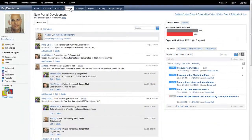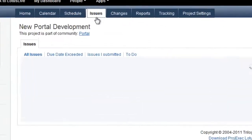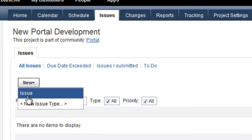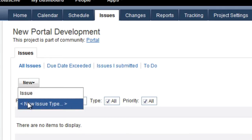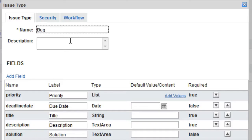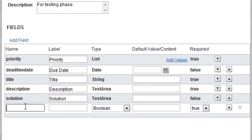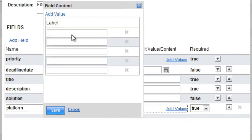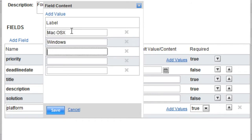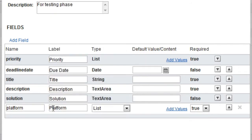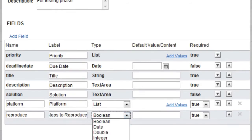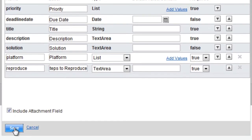ProjExec ships with a single default issue type, but also allows project managers to define their own issue types to reflect the various kinds of situations that are unique to the project. Issue types define the data fields necessary to collect for the issue, the people who will be responsible to manage the issue, and the workflow associated with the issue.